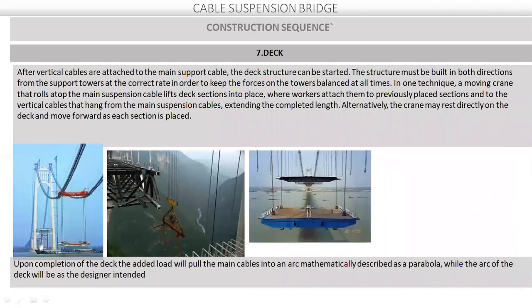Next is deck placement. Using the suspenders, the deck sections are placed using cranes. The deck will be placed on both sides to balance the forces.